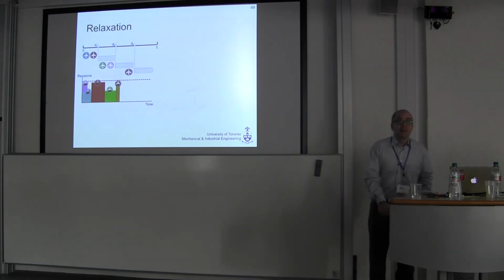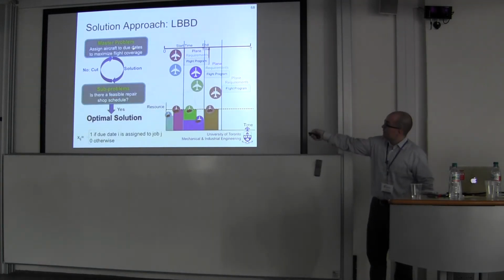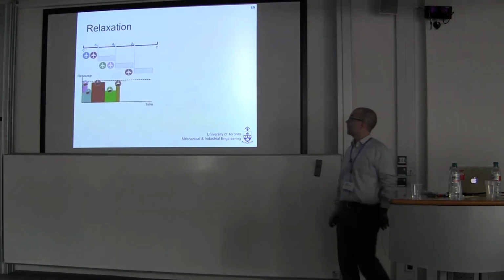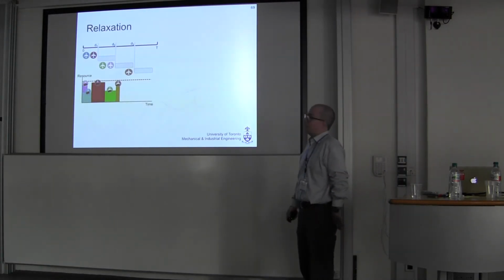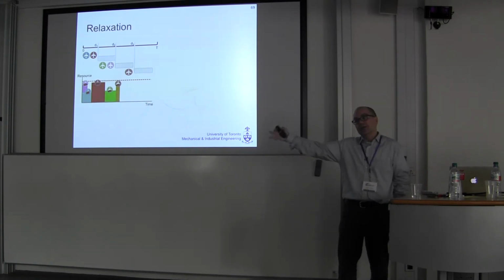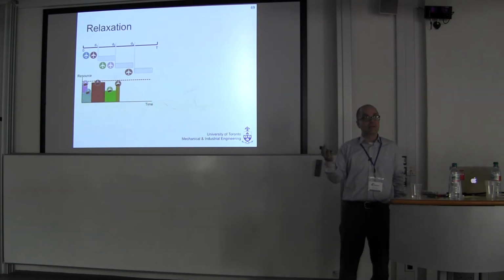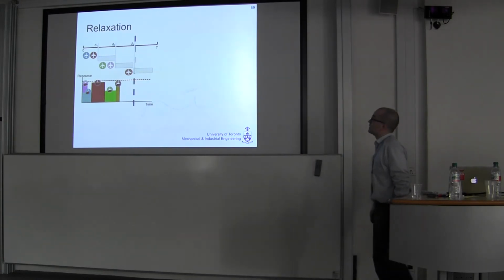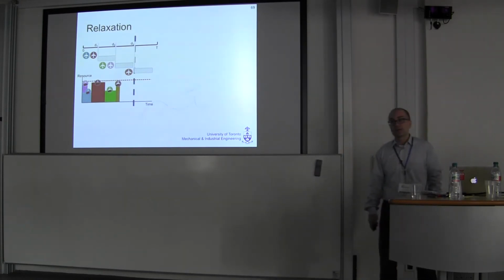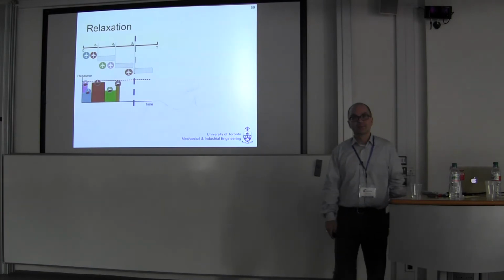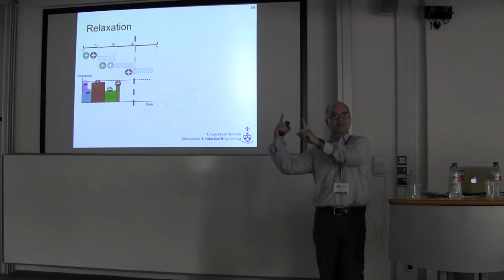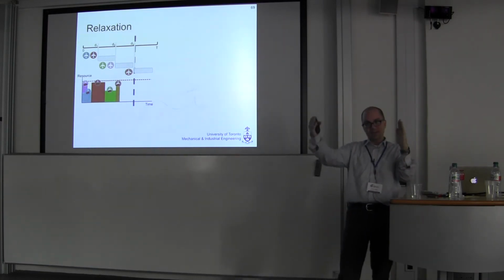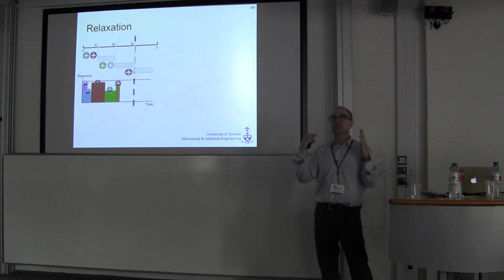I need a relaxation of my master problem, right? Up here I want to assign due dates. So what's my relaxation going to be? If I just do it blindly, not taking into account the capacity of my repair shop at all, I'm likely to have to iterate many times. So I'm going to do the same relaxations that I showed you before. In this case, it's a bit simpler because I don't have to take all pairs of start times and end times. I can actually look at the due dates.